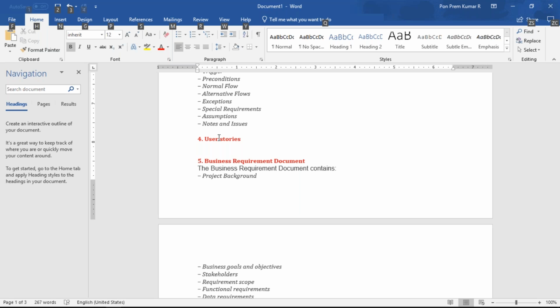You'll be asking the story point value for the online submission form. The development team and QA team will be sharing their own story points. For example, the development team will say the story point value would be 4, and QA will say, in terms of testing, maybe 6, because it requires multiple forms, multiple fields, multiple dependent fields, multiple options to be collected. So they have to validate in a lengthier manner. So they may say the story point value is 6. You have to find the average and mark it down.